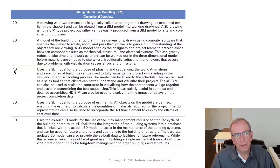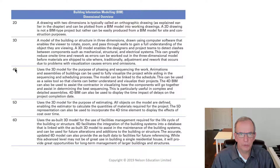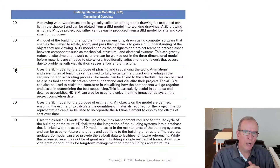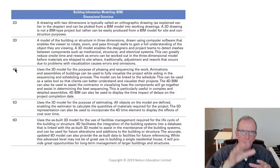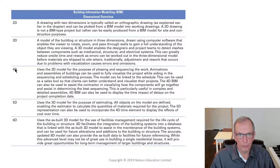4D is when you have the model on a timeline — you're watching the project be built, which I was just mentioning with changes and claims. But you can also do 4D to plan out the project. Many GCs will do it as a selling tool, showing the client: in month one we'll be here, in month two we'll be here. The building goes together month by month. The client sees their building built before their eyes, and that builds a lot of confidence that it's been a well thought-through process. So 4D is scheduling — at the crux of it.